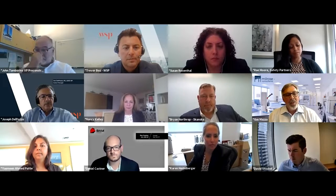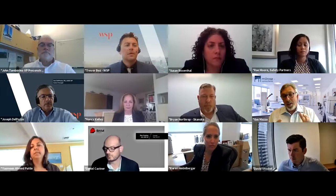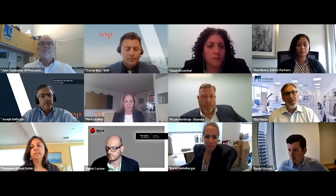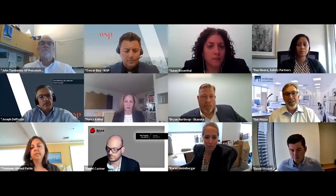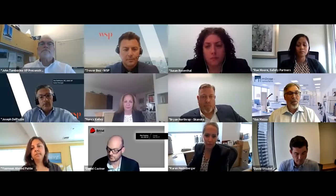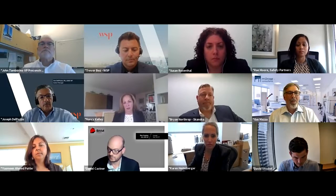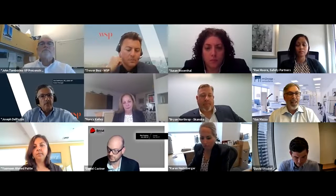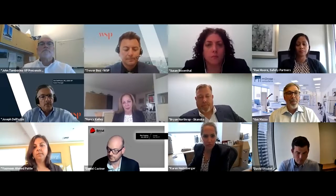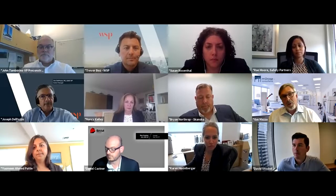So that's a discussion that we all need to have early on to determine what kind of client they're going to be catering to. Obviously, with an existing building, you reposition, the building's already built, the infrastructure is there and is being modified or added to or changed. The C of O is already there, and we're just modifying the floor as we need to, or parts of the floor. So the turnover into construction to occupancy is much quicker than when you're doing a new building where you have to get the core and shell completed and all the systems completed before anybody can tie in. So again, it's speed to market. If you have a building repositioning and it's existing, and if Dan and Trevor make it work, then an existing building would always give you a quicker path to occupancy.